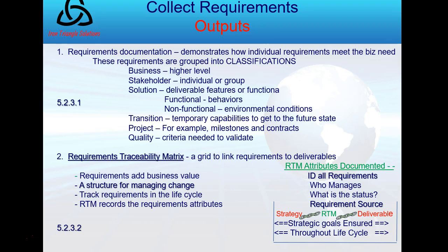Before we baseline, which we're going to do in another lesson or two during this week, requirements need to be unambiguous, measurable, testable, traceable, complete, consistent, and acceptable to key stakeholders.